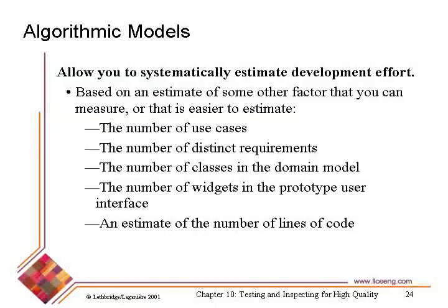Some of these techniques are based on the number of use cases, so you do use case development, and then you analyze each use case, and it gives you an estimate of time early on. You have to refine that as you get down into design, of course. Some are based on aspects of requirements. There's a thing called function points that analyzes the requirements and gives you an estimate of time based on industry-wide experience. Of course, it might not apply to your system quite so accurately, but it's still better than nothing to do this. Some are based on the number of classes in the domain model.